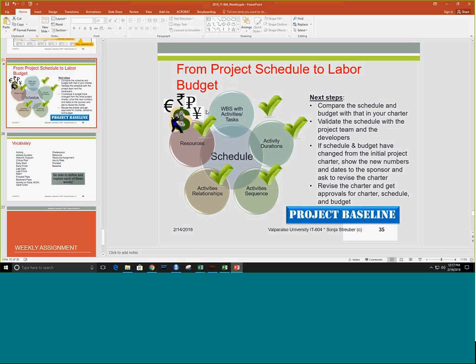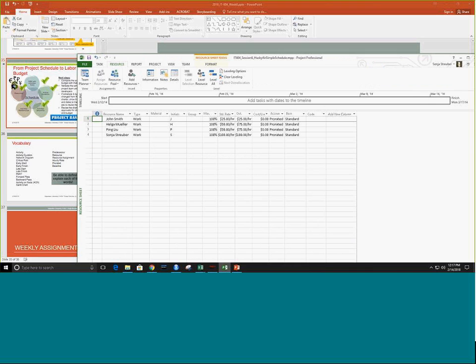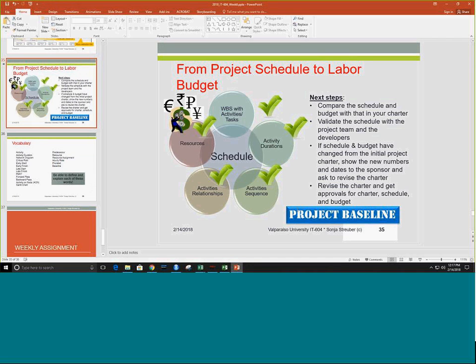However, once it is done in project budget, once it is entered in Microsoft Project or whatever other project management tool your organization uses, that becomes what is called your project baseline. The baseline is what your entire progress throughout the remaining phases is being measured against.